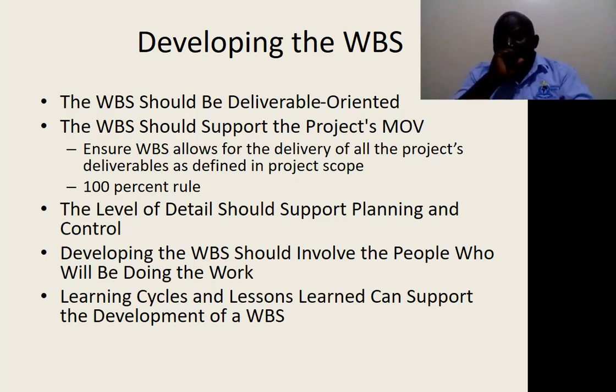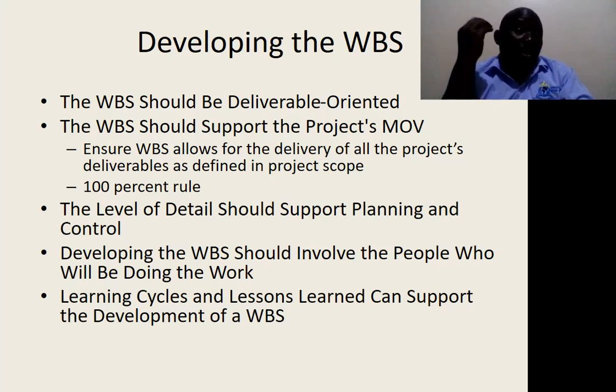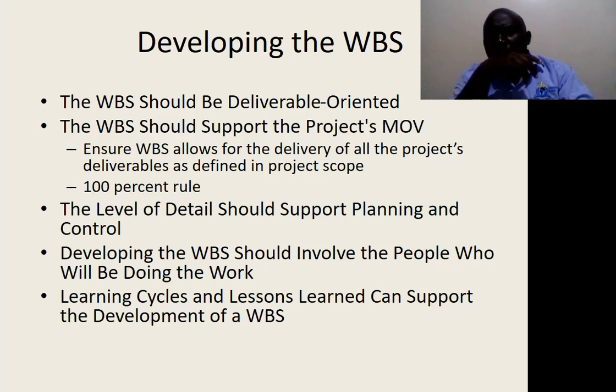And of course, these have to start from the point when you're planning and how you're controlling. And so when we're developing a work breakdown structure, it is very paramount that we involve the people who, at the end of the day, are going to be participating in this project. You don't want to bring people who are not affected by the project, who are not going to work on the project. And so we are saying you're breaking down this work based on the people that you want to involve in the project.